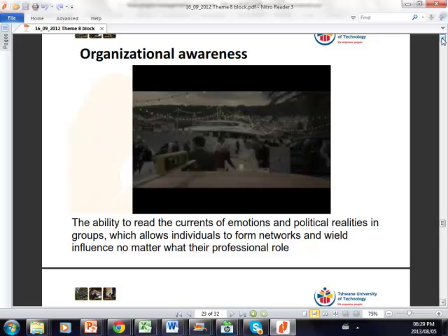Okay, so one of the guys that writes a lot of books on human resource management and project management, Vijay Verma, says that there are three levels or three ways in which one can be organizationally aware or organizationally unaware. The first level is where you are a typical technical person and you have this beautiful project plan, and it's beautifully done even with colors in Microsoft Project. And you're tracking the progress right down to the last day, and you are perfectly on budget, and you're convinced that you're meeting the client's specifications. And the next day your project is cancelled.